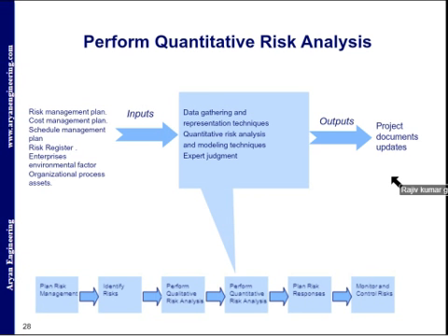I like to highlight, most of the people get confused between the qualitative and quantitative risk analysis. Remember that qualitative risk analysis is a subjective evaluation, even though numbers are used for the ratings, like we use 3, 1, A, B, C. Quantitative risk analysis is more objective, a numerical evaluation.